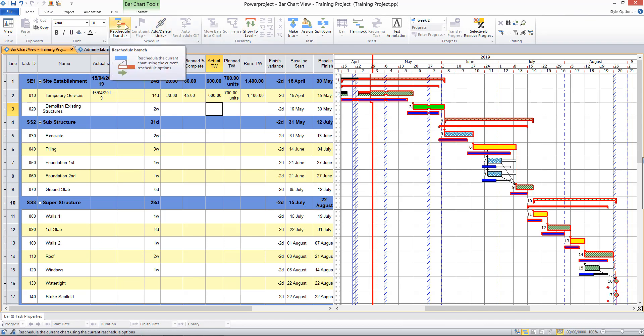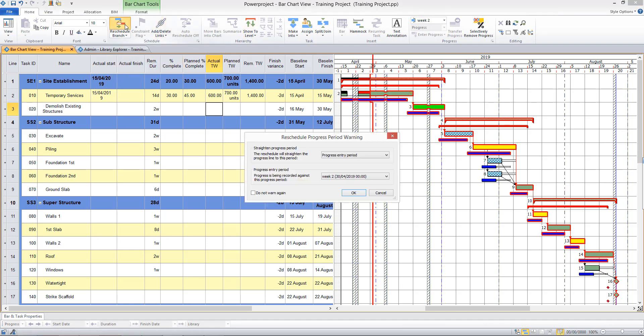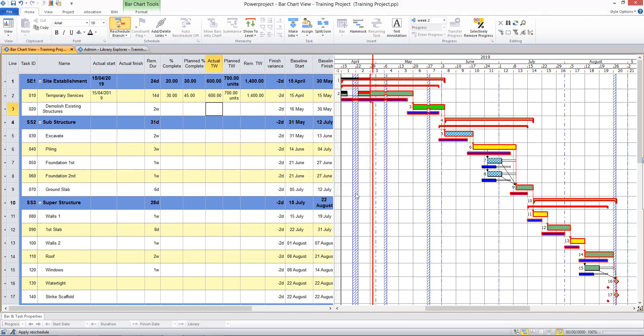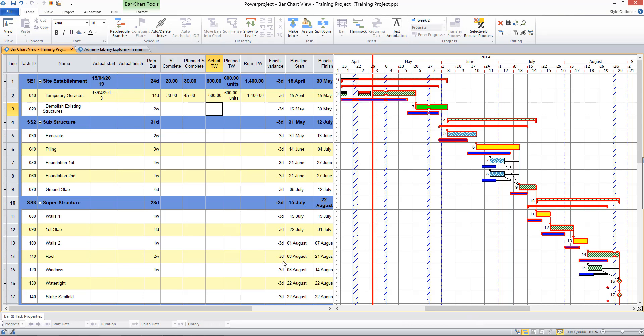To straighten the line, I'll repeat what I did before and reschedule to the current progress entry period. And again, things have moved forward again slightly. I'm now three days behind.